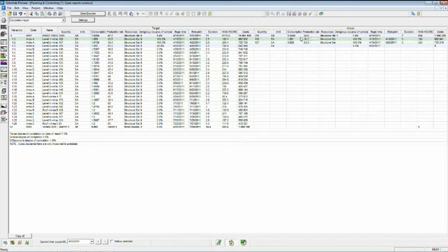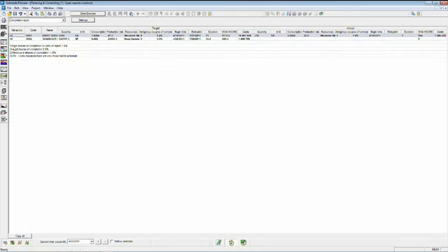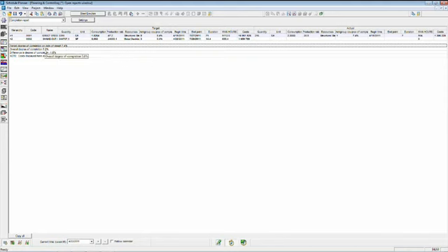What we were actually seeing is 36.3 in the actual production. With the overall impact in summary form of the schedule down here, the target degree of completion on this date is 7.4% for the project. The actual degree of completion is 5.9%, which is a difference of 1.6.